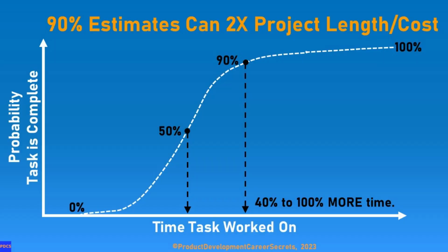If you use the 90% estimate, you can pretty much guarantee the effort will expand to take all the time estimated. Things expand to take the time they're given. My experience over many projects indicates that the project will probably take somewhere between 40% and 100% more time. The result of this expansion: higher product launch costs, arriving late to the market, your competitors beat you. None of this is good. Nothing good is going to come of this for the project or for you.